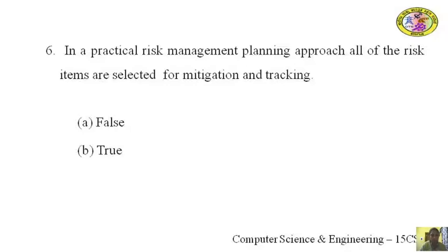Yes, it is option A. The above statement is false, because in a practical risk management planning approach, only a top few risk items are selected for mitigation and tracking, not all of them.